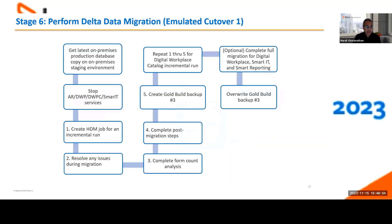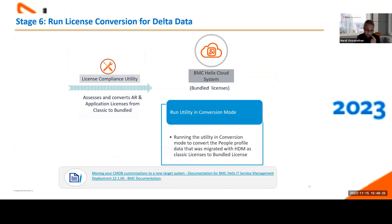For the emulated cutover, get the latest database copy from production, put it on staging DB, stop all services, and run an HTM job in incremental mode. Resolve any data migration issues, and repeat this for Digital Workplace Catalog. ITSM and Digital Workplace Catalog are the only two applications you need to run delta migration for — Smart IT and Smart Reporting have minimal data volumes and support full migration later in the cycle. Again, run the License Conversion Utility in conversion mode to convert any classic licenses in the newly brought people profile data to bundle licenses.